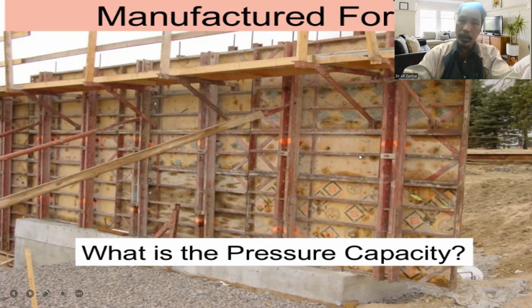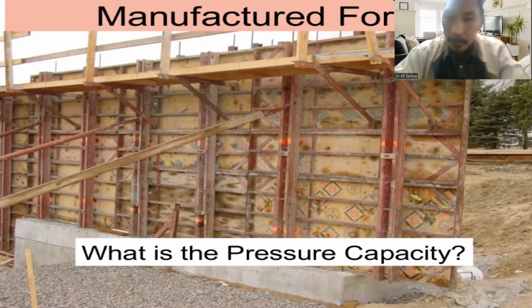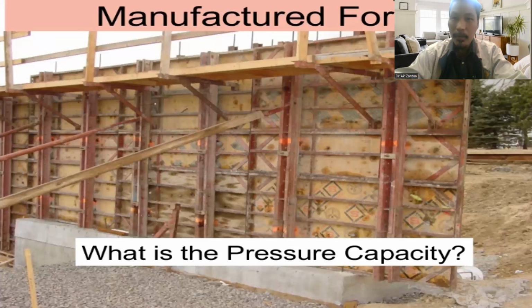Manufactured forms, these are because Formworks and Falseworks are costly, they actually manufacture the Formworks currently in order for these Formworks to be reusable, because the cost will be divided. For example, you can have a Formworks that could be reused 3 times. So the cost would be divided by 3.